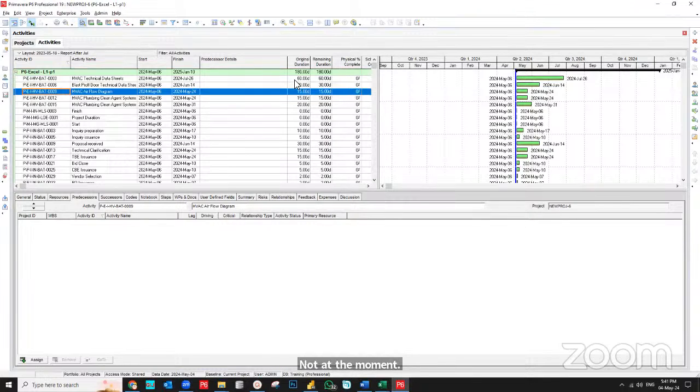Another question. You talk about lag. It's difficult to find it. You use predecessor details. Is that the only method that we can use to find the lag at the column side? On the column side, yes, it is only available in the predecessor details, but it is not the good one. For instance, if you ask me, my answer is to use the report. With the help of the report, you can generate the lag report. Thank you. You're welcome.